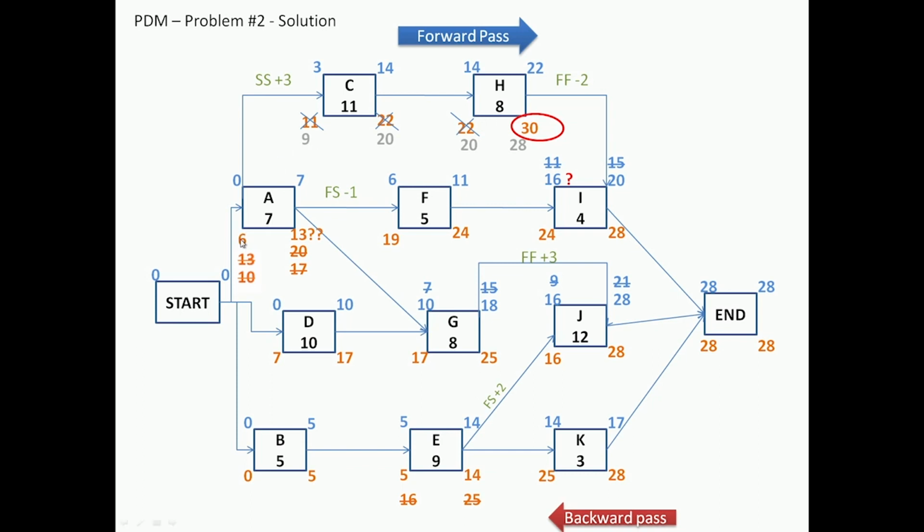So I have to start on or before 6, and I have to finish by 13, but do I really need to finish by 13? If I finish later than 13, what happens? Really, you can see that none of these activities get affected. So why am I constraining myself? This is the question that we need to see.